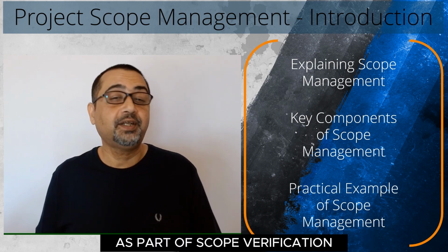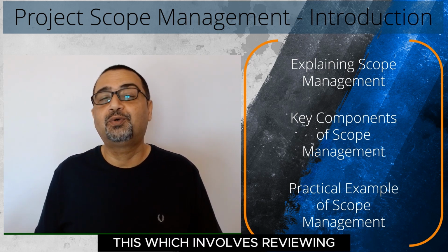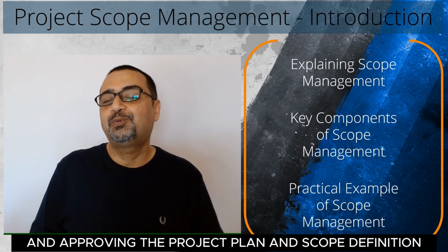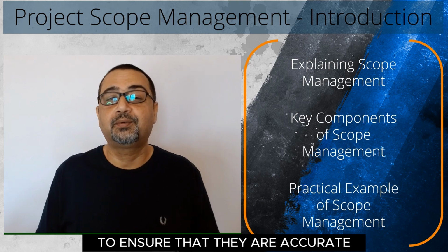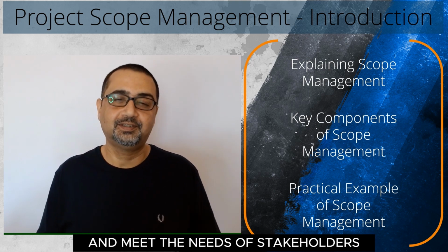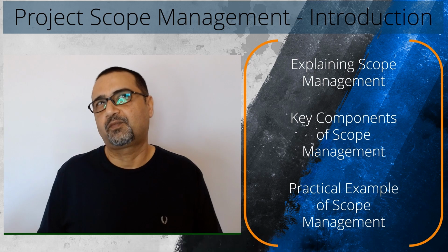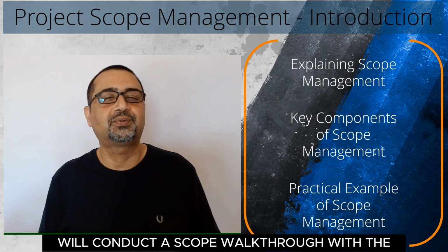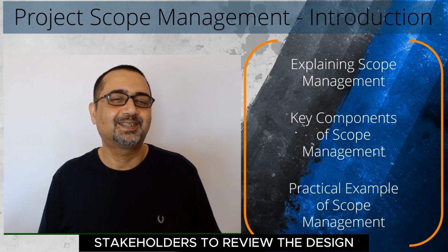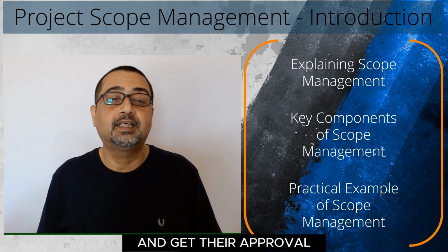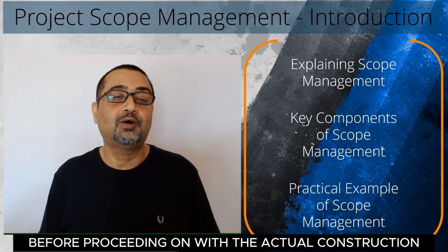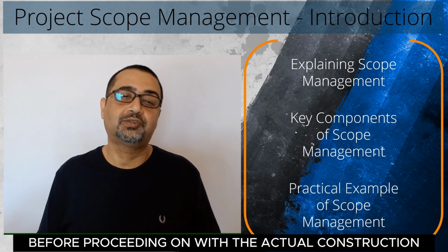As part of scope verification, which involves reviewing and approving the project plan and scope definition to ensure that they are accurate and meet the needs of stakeholders, the project manager will conduct a scope walkthrough with the stakeholders to review the design, the schedule, and the budget and get their approval before proceeding on with the actual construction.